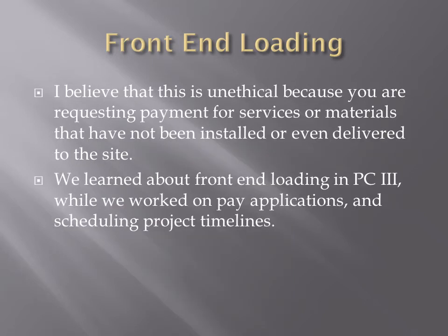Also, in my personal opinion, I believe that it's unethical because you're being paid for something that you have not yet done or materials that have not been installed. It can be viewed either way, as either ethical or unethical. Some companies don't have the money or the funds to do a project, and they don't want to pull on a lot of credit, so they will go ahead and front-end load a schedule in order to be paid more money throughout it.